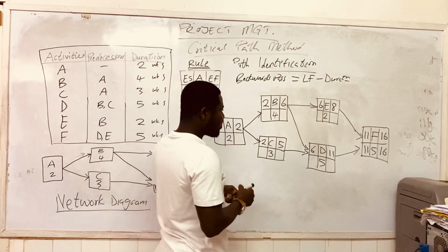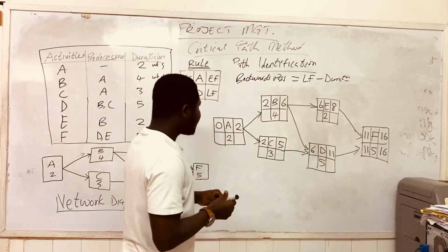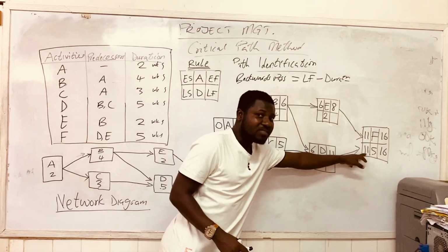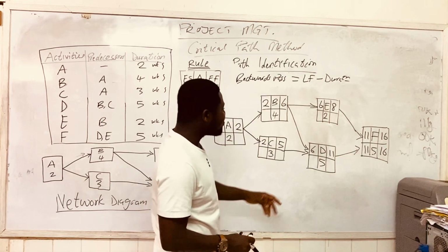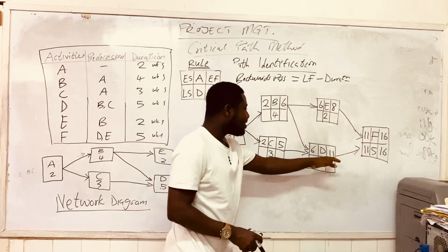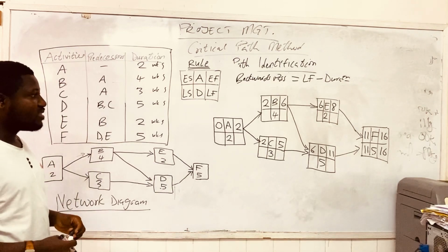So the latest start time for activity F is going to be the latest finish time for activity D.